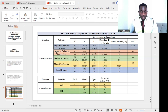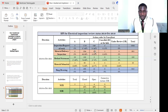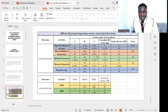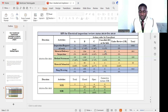Moving to the second part — material delivery inspection or material inspection request. Under Code A we had zero percent. Code B we had 294 inspections, which resulted to 96.39%. We had 10 total inspections that were not approved or revised and resubmit, resulting to 3.28%. One was cancelled with Code D, resulting to 0.3%. Under review was zero, for a total of 305.